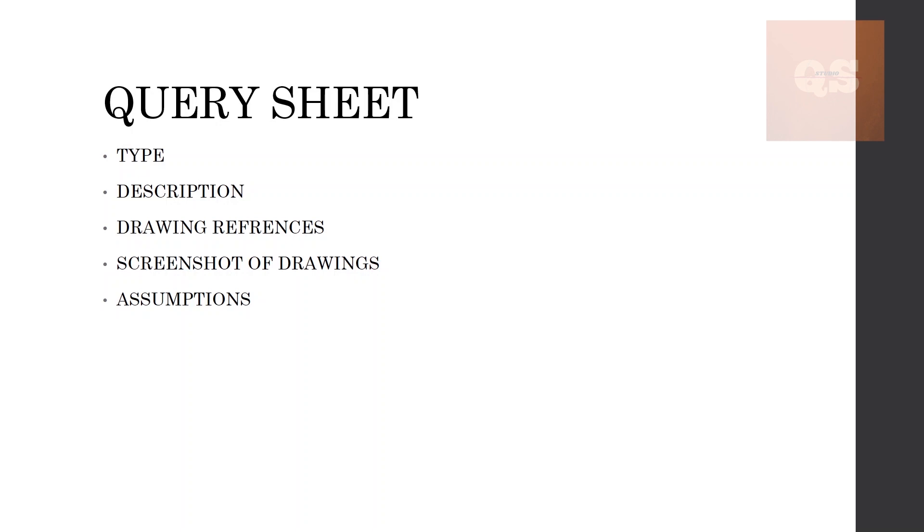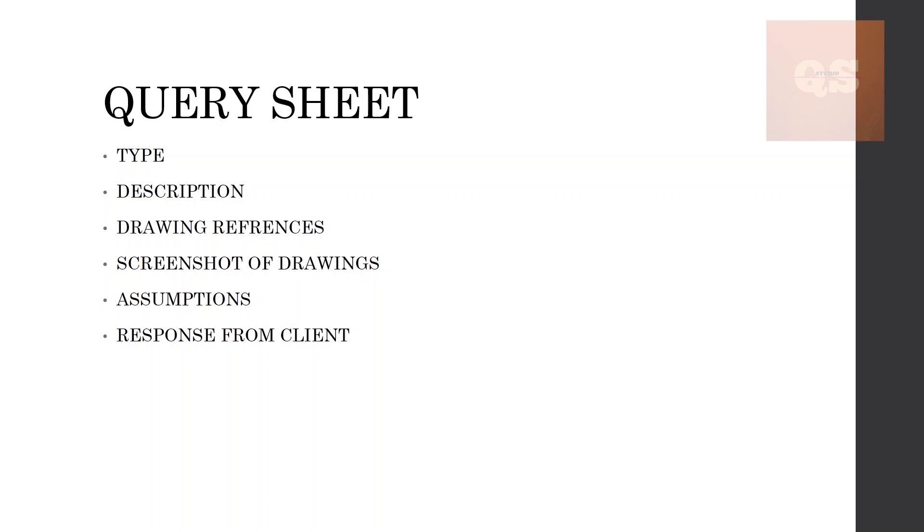Then the response will be there from the client. There you can put a column for that where the client can fill in the responses. They will respond that if you assume something, they will confirm that is okay, you can move ahead. Or if you assume something and they are not agreeing to it, they will put up their response that for such and such pipe you can use this dimension, or such and such drawings will be sent to you within tomorrow or within two days. They will put their answers to all your queries under this response from client column.